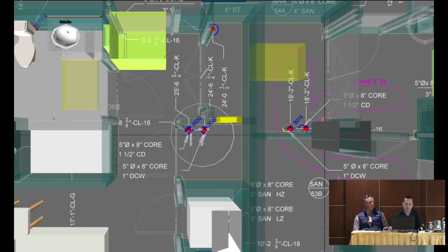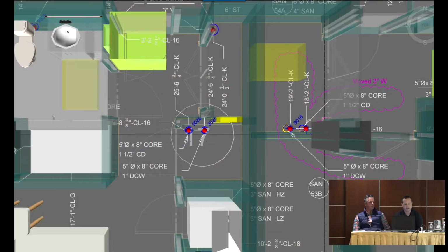So we had them provide us with fully annotated drawings early, 3-dimensional cores. Since we're doing all the layout, every point number you see noted here in blue, for example, comes from the Davis field engineers. We use APL to pull in those text files, and then we give the points a volume and a color, so we make them a red sphere.